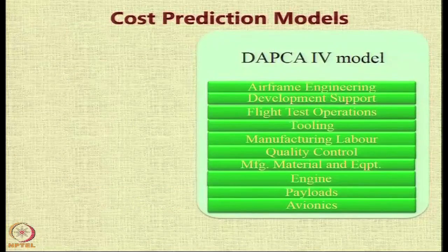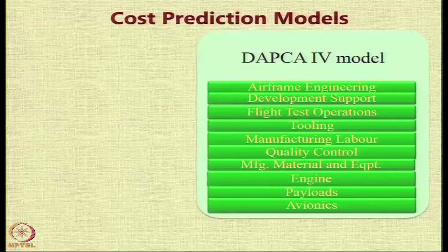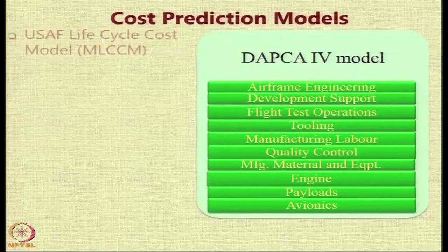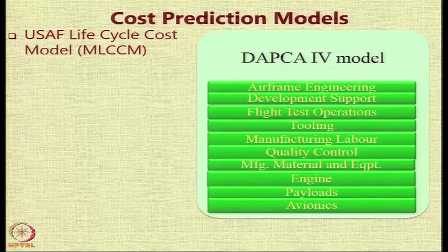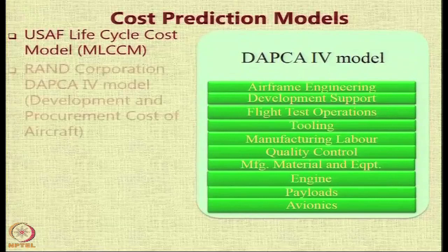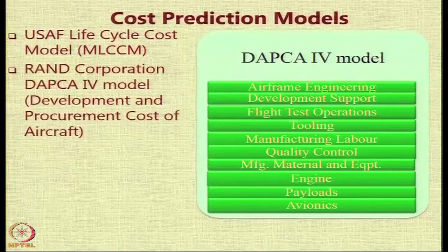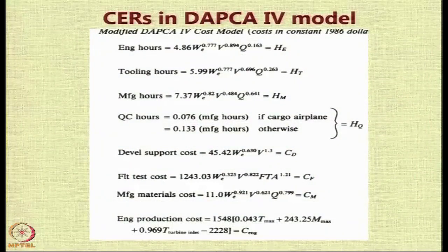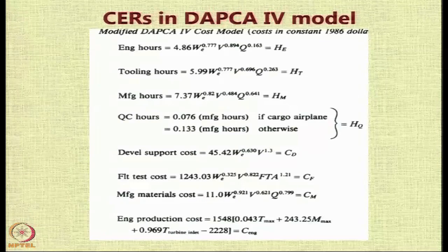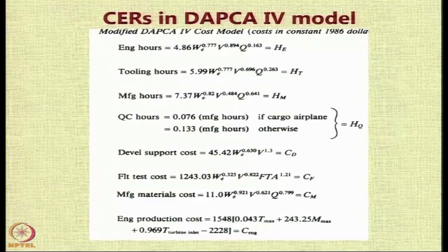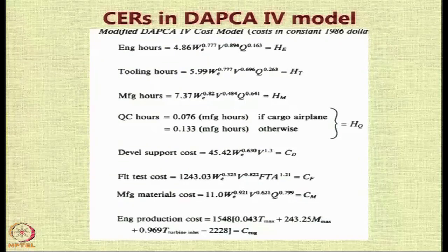The cost prediction models — I mentioned the RAND-DAPCA-4 model, which is a standard model, but there are others as well. For example, the US Air Force has a life cycle cost model called MLCCM. The DAPCA-4 equations are applicable for 1986 dollars and have to be scaled up using an inflation factor. These equations are available online or in standard textbooks like Raymer.